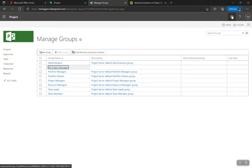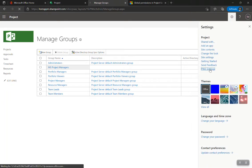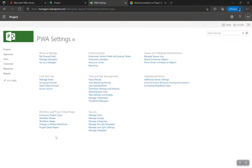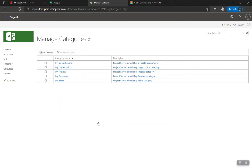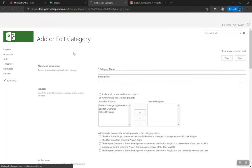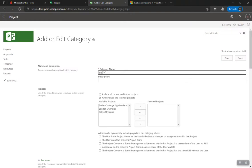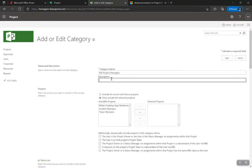Let's go back to Manage Categories. Groups define what I can do; categories define what I can do to projects, resources, and tasks. I'll create a new category called 'MS Project Managers' with a description: 'Custom category for project managers'.